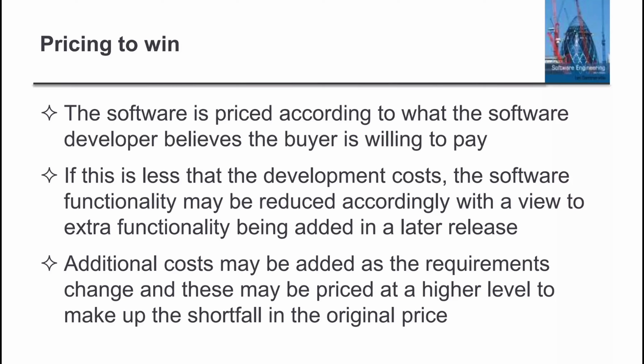Price to win: when we do a contract, we do a bit of analysis on how much price we can offer. We take the coding into account and can demand more price or demand less than our development costs. If this is less than the development costs, we have less demand, so software functionality may be reduced accordingly — with extra functionality being added in a later release. Then we will charge them for that.